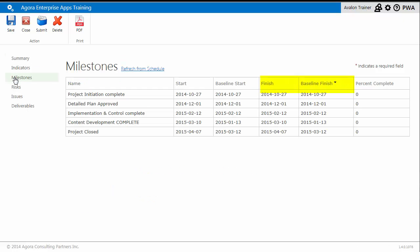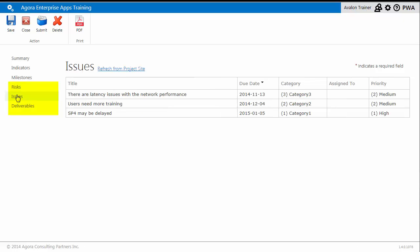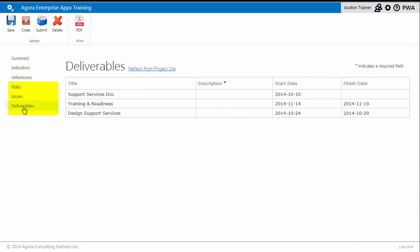The milestones are pulled from the project schedule and display baseline data compared to current schedule. The risks, issues, and deliverables are all pulled from the SharePoint list on the project site.